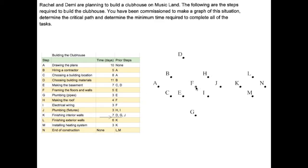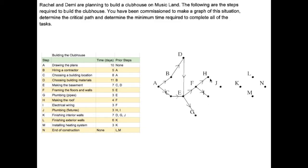H has F as a prerequisite, so F goes to H. I has F as a prerequisite, so F goes to I as well. J has H and I as prerequisites, so H and I both go to J. K has D, G, and J as prerequisites — that's why I put D so high up, to get a straight line to K. J goes to K and G goes to K. L has K as a prerequisite. M also has K as a prerequisite. N has L and M as prerequisites. Drawing the arrows: A goes to B and A goes to C. B goes to D. C goes to E. D goes to E. E goes to F and G. F goes to H and I. H goes to J and I goes to J. J goes to K. D goes to K as well. G also goes to K. K goes to L and M. L goes to N and M goes to N.